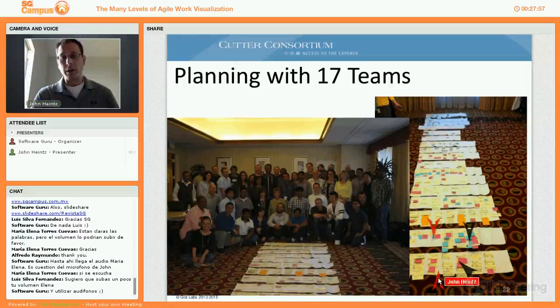What we can see is the pink sticky notes. So each of these pink notes, so that is a pink sticky note right there. There are 3 of them in a column just below this arrow. Each of these pink sticky notes, we picked that color to stand out. Each one of those for this teaming activity reflected a dependency on another team. And that other team then had another post-it note on their backlog that reflected doing that work, either at the same time in collaboration with this work, the pink sticky note, or ahead of time so that it was ready when the team with the dependency needed it.